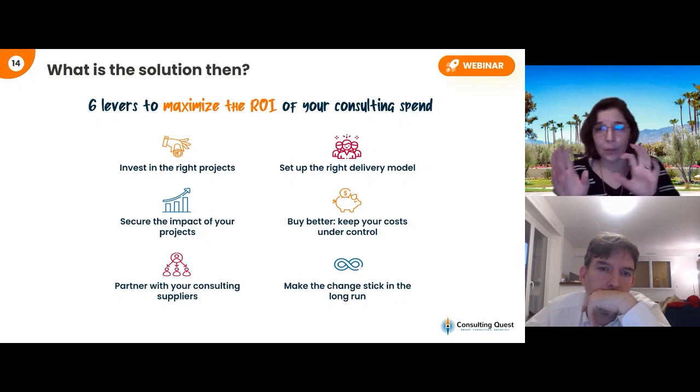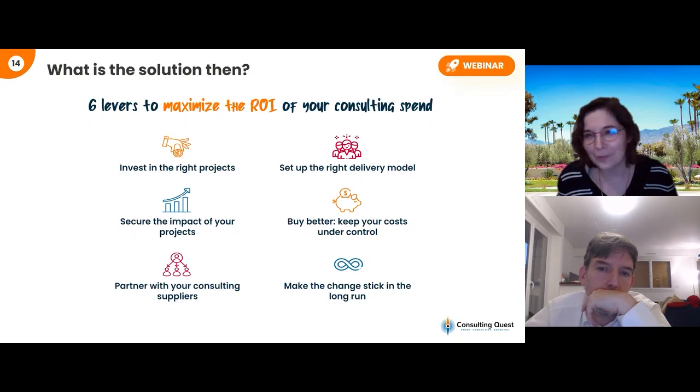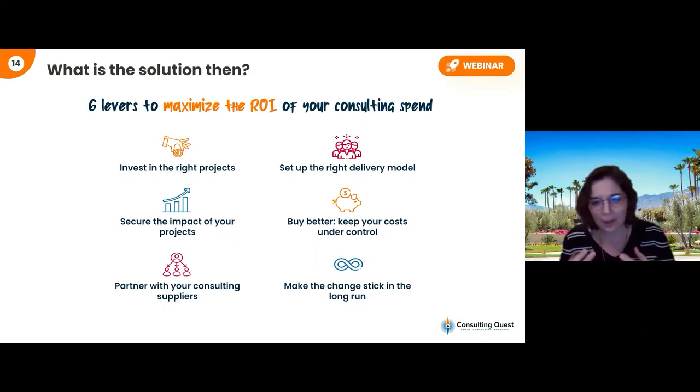And at the end, the vision of the consultant and the client were completely different, and there was a huge conflict in order to settle the invoices and the payments. And you don't want that. You want to make sure that even if you go over the price, it's because it was decided together with the consultant that it was the right option.